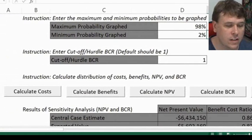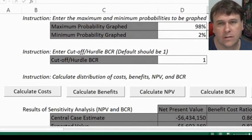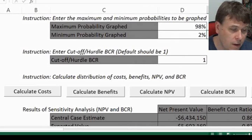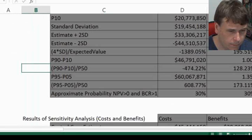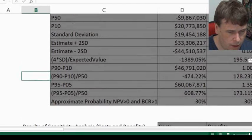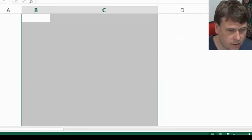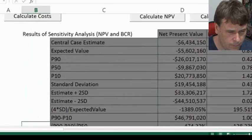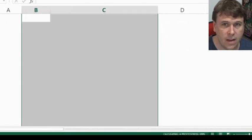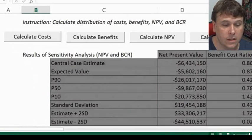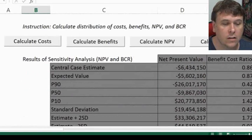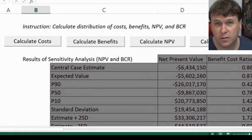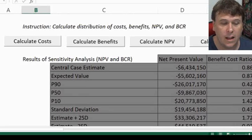Once we've done that, you need to calculate your costs, your benefits, net present value, and benefit cost ratio individually. This is just feeding off your probabilities — it's a much quicker way of calculating it than actually running your Monte Carlo simulation, which I'm going to show you later. Monte Carlo simulation may be more useful if you have fewer probabilities to calculate.